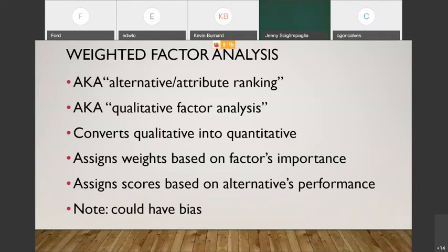And one more tip that I got from Colin Seftel, who I met in South Africa when I was attending the CPSM conference, that's South Africa APICS. He recommended that you set a minimum score within each factor. So in other words, you say the suppliers have to get at least a 5 out of 10 or a 6 out of 10 on everything. The important reason for that is maybe some supplier scores a 10 on a couple of the most important criteria, and they end up winning, even though they have a 2 or a 3 on other issues. And I thought that's pretty good. Set a minimum score for each one. So that might be a suggestion.